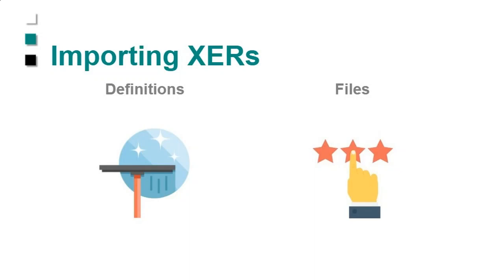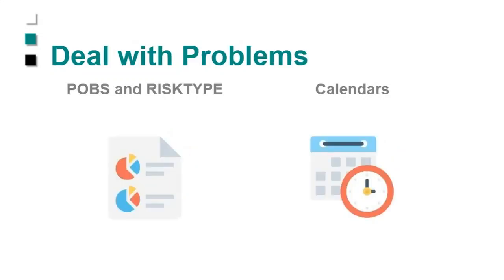So if you're getting a schedule from a contractor every week, for example, you would reuse the definition. Anything new will be kind of highlighted for you, and then you can update the definition, and off you go. Okay, so it's quite quick and quite easy to work with.